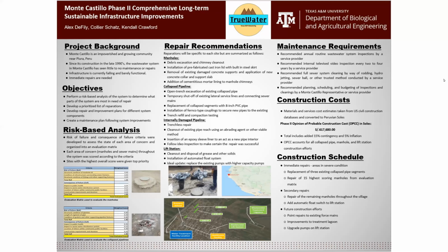As a general schedule for implementing these recommendations that we've developed, we broke it into immediate repairs, things that we think should be done immediately to the system to prevent further damage; secondary repairs, which are things that we think should be done before too long, within the next year or so; and then future construction efforts, things that should be done eventually.